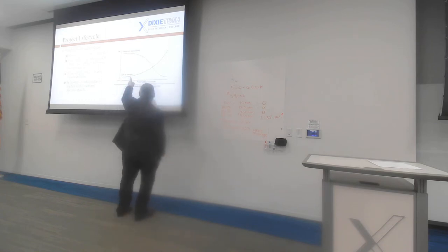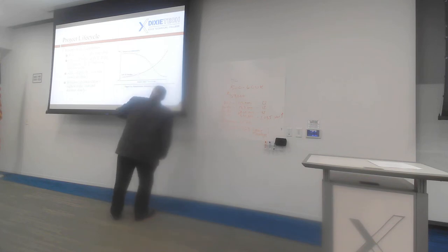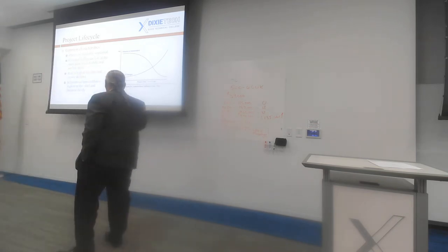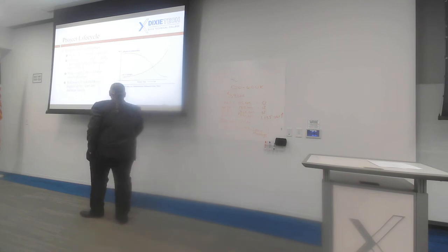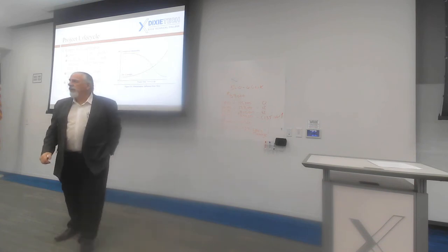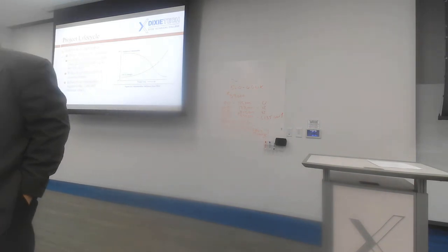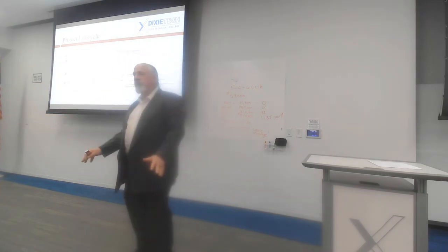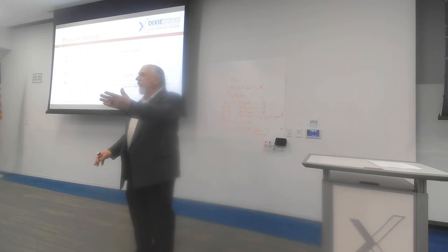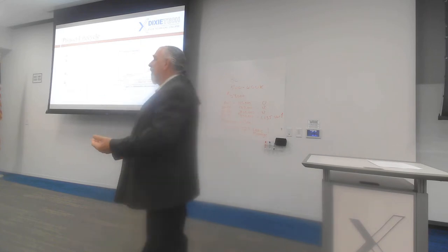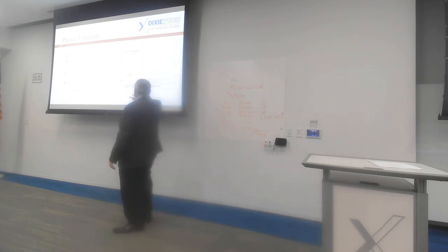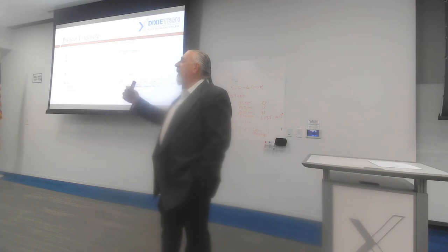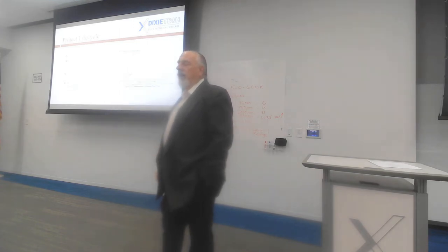to make those changes. And at the same time, the stakeholders become less able to dictate to us what we're going to do. So our project management hat becomes different. When the project is brand new and kicking off, the stakeholders are calling all the shots, including the threat that if this doesn't line up the way we want it, I'll cancel the project. And they'll pull the plug on it, and when they pull the plug on it, everybody scatters with their hair on fire and goes, holy cow, that was my job for the next 6 months. Now what happens? And maybe I don't have a job. Maybe we don't have a replacement job in place when that project gets trashed. So we're very, very respectful of stakeholders in the very early stages of the project because of the threat of them being able to terminate the project.